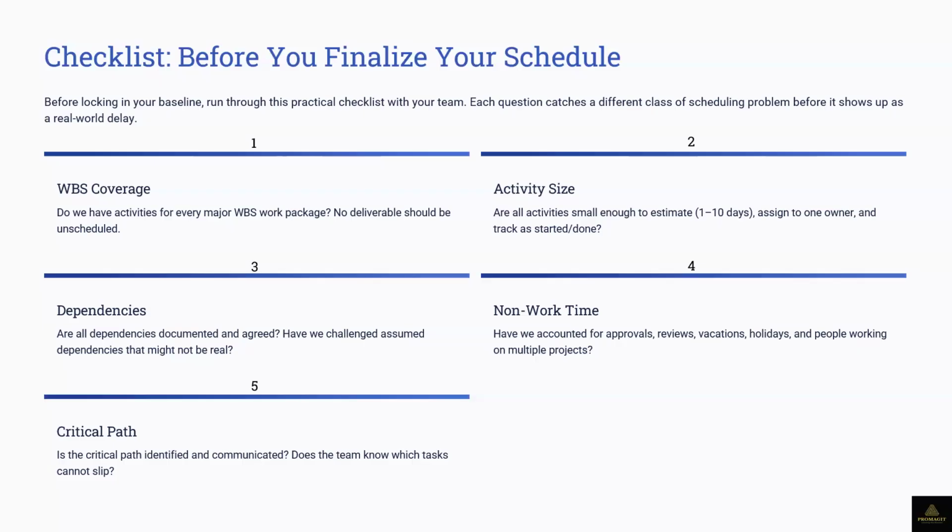But once you set a calendar, depending on the kind of organization you work in, you don't have to go through it again. If another project comes, you can pick up that calendar and use it. You have to sit down and build your calendar. That takes a bit of time, especially if the project is going to last 3, 4, or 5 years. You name it, but you can use it for other projects. If another project of that nature comes up, you don't need to start building another one. You can just adjust.